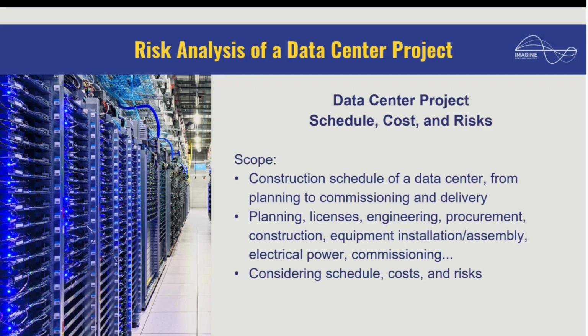If it's an offshore drilling project, the drilling rig is the big resource that drives the whole cost, and that's where they have to plan a bunch of schedules using the same resource, sometimes a portfolio of different projects sharing the same resource back to back. So the resource is very important in oil and gas, and in some other industries too.